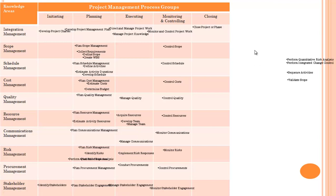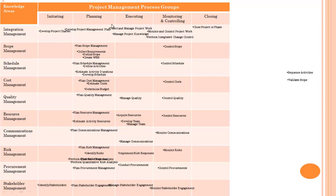Perform qualitative risk analysis will come under risk knowledge area. Perform quantitative risk analysis — both come under planning process group. Perform integrated change control will come under monitoring and controlling. Sequence activities will come under schedule management knowledge area and planning process group.